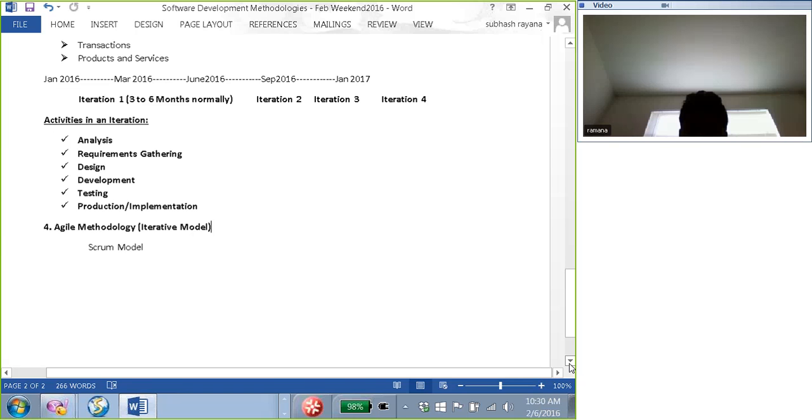I used to go to each project manager or team lead and ask them, okay, last week you were 30% complete on the project. Where do we stand today? What's the progress? Update the plan. We had a simple Excel sheet where I used to update, and before the meeting, I used to publish this to everybody, and everybody used to start looking at it.